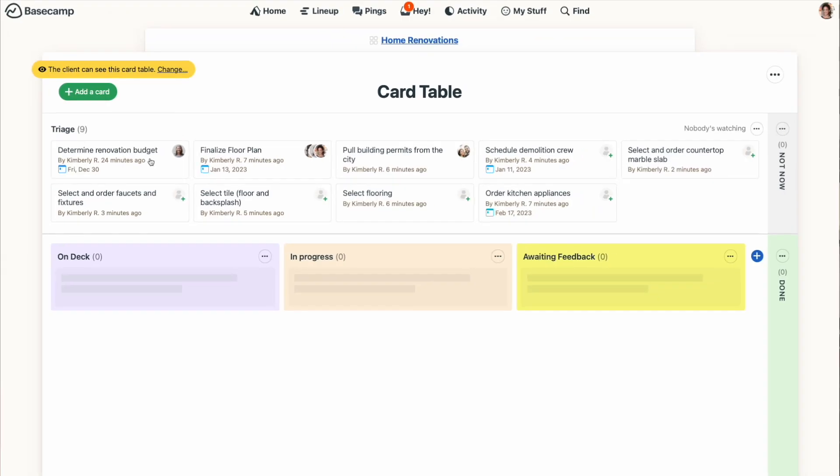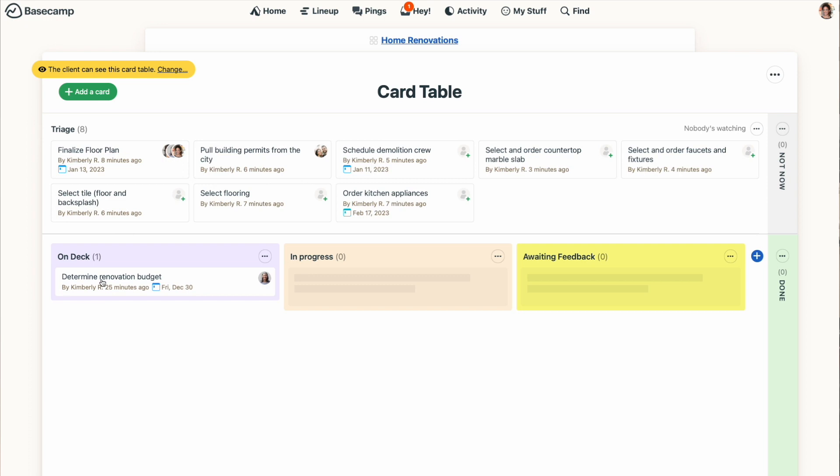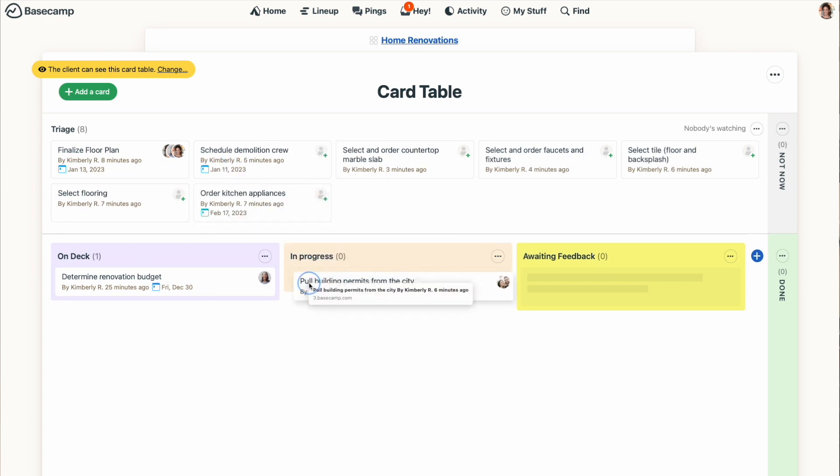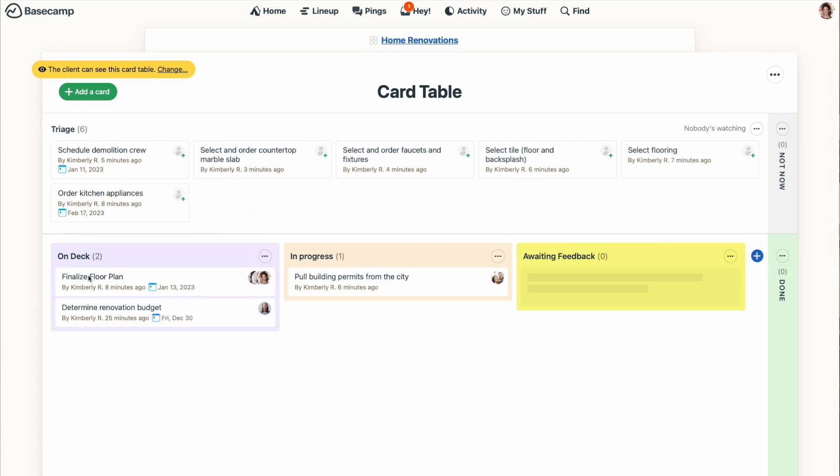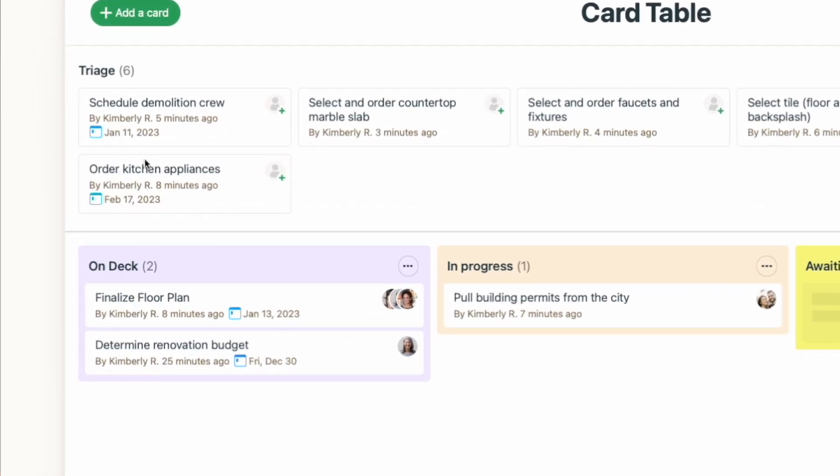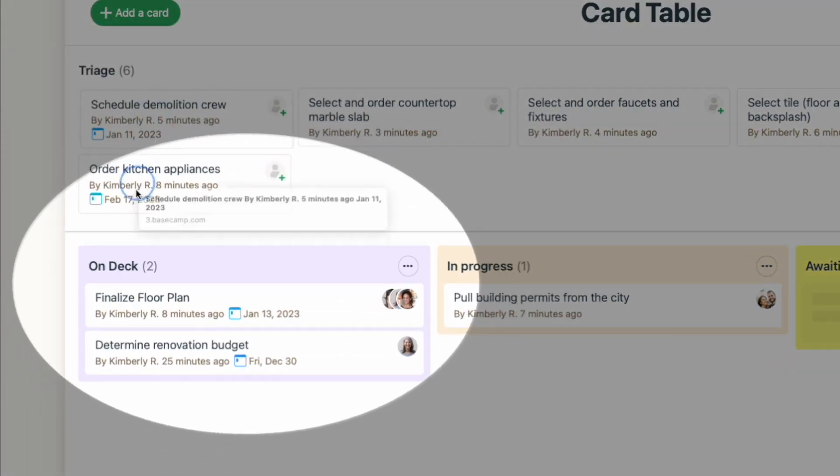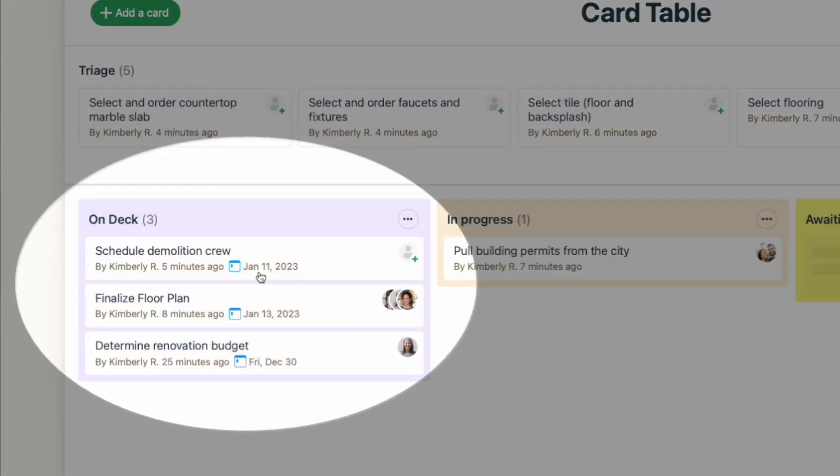When you're ready to start working on a card, you'll drag that card from triage down to the working section. Typically, you'd be moving a card from triage into your first or far left column, but if a task is already somewhere else in the process, you can drag it there too. You'll see that the column header updates to indicate the number of cards in that column.